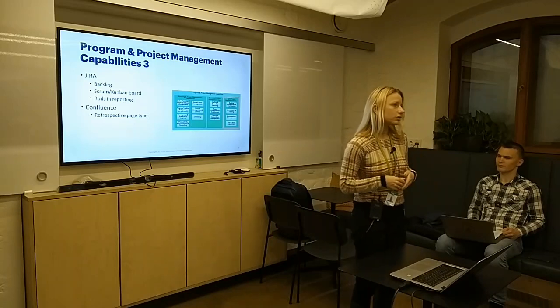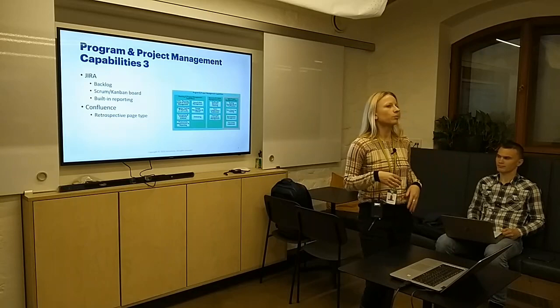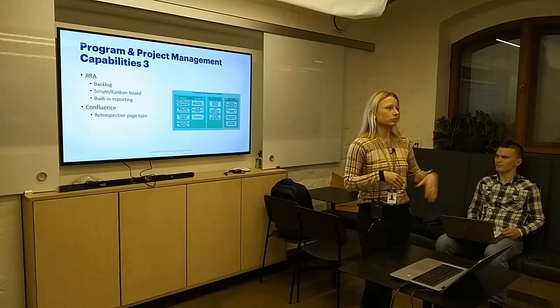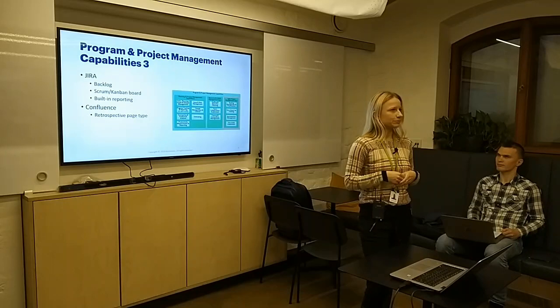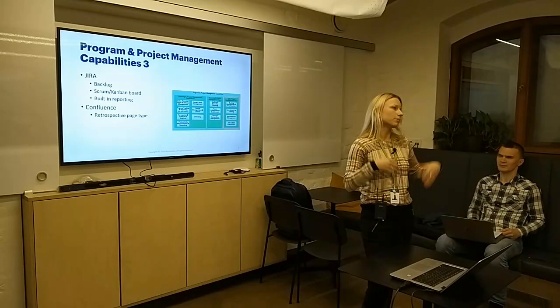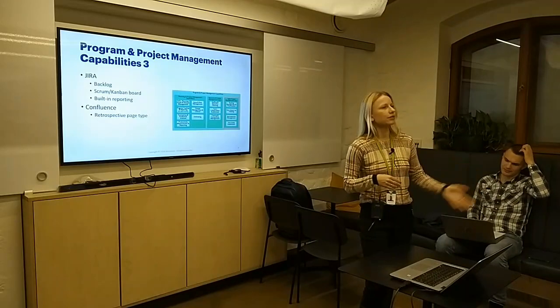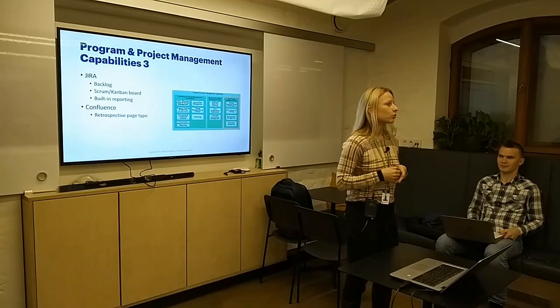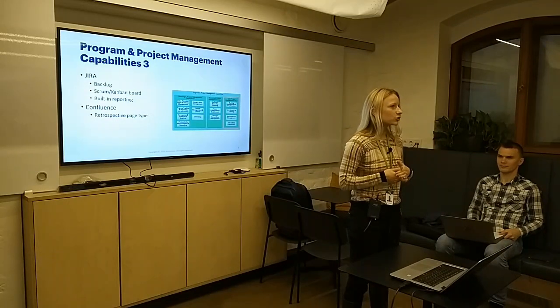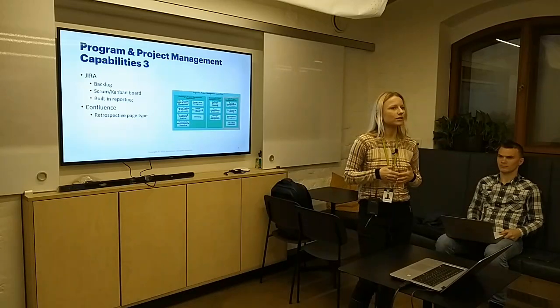So you use backlogs, you can drag and drop according to priority, top priority items to the top. If you, for example, use Kanban methodology, so take the most important from the top when somebody is free and enable this workflow. And our team, our DevOps team works per Kanban methodology, so we still have like cadence with another teams.